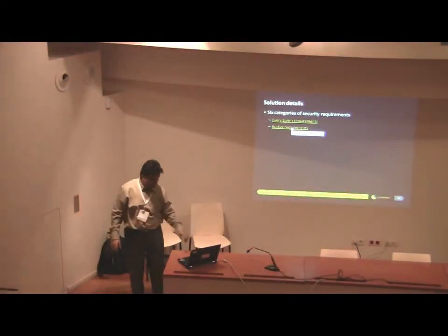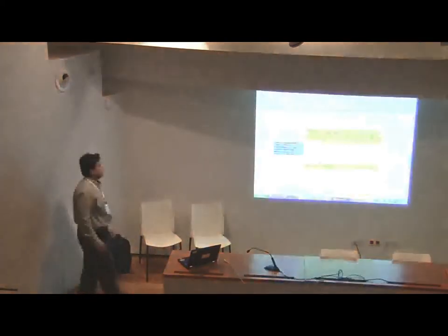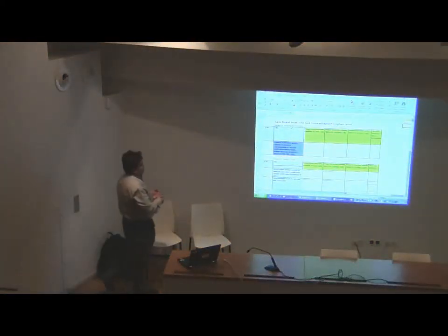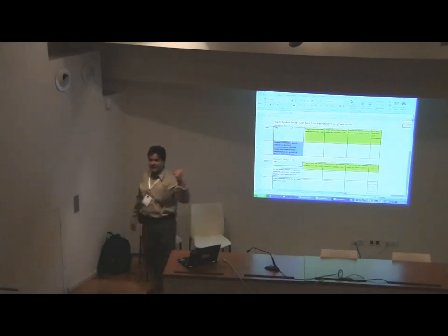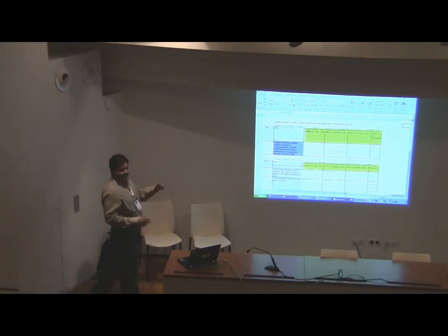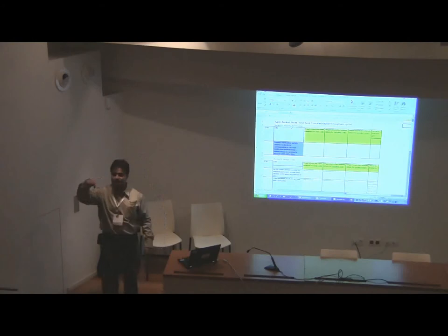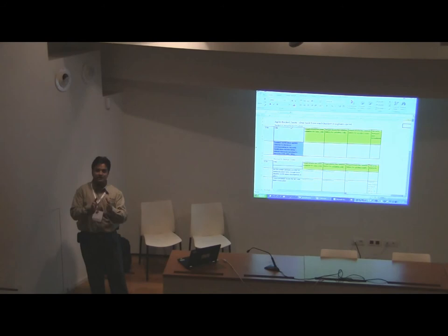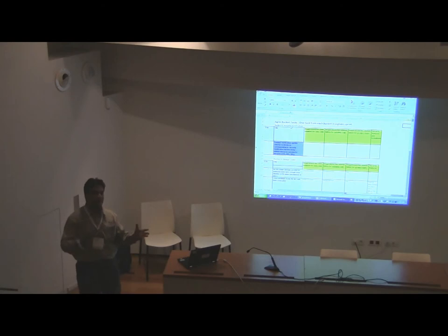Now, the bucket requirements are given a brief description here. Bucket requirements, again, the description of the buckets has been retained from the Microsoft SDL document. It's essentially you have a bunch of buckets, right? And you pick up one task, one task from each bucket in a given sprint. So let's say for a given feature, you decided to have 10 sprints, right? You take sprint number one, come to the bucket here.